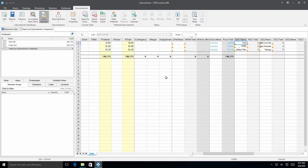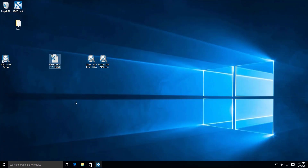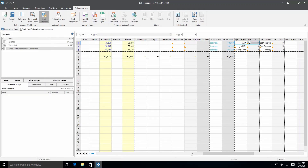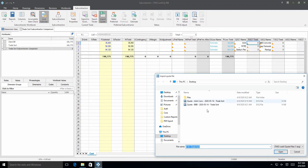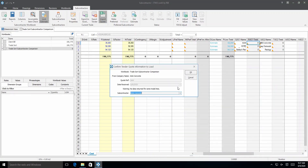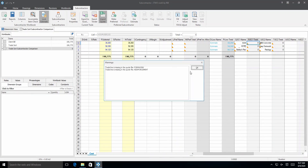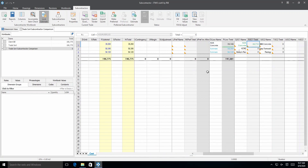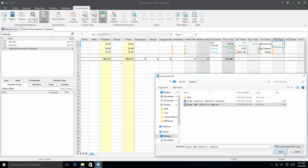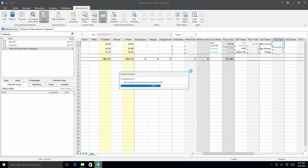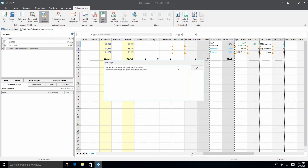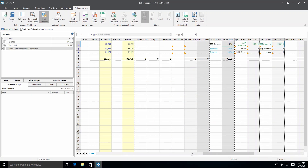This can then be sent out to our concrete subcontractors. Now, say we've received the completed file from a subcontractor. To import, click any cell which has the subcontractor's name or total, then click the import quote button. Select the prepared quote from the folder to import the quote. A price of $36,716 has been entered in cell R1 as the total price of the first subcontractor. We can also repeat the same process for the second subcontractor. A new i2 CostX feature is enhanced support of formulas when using export to Excel. This also applies to the export trades to Excel function in the workbooks tab.